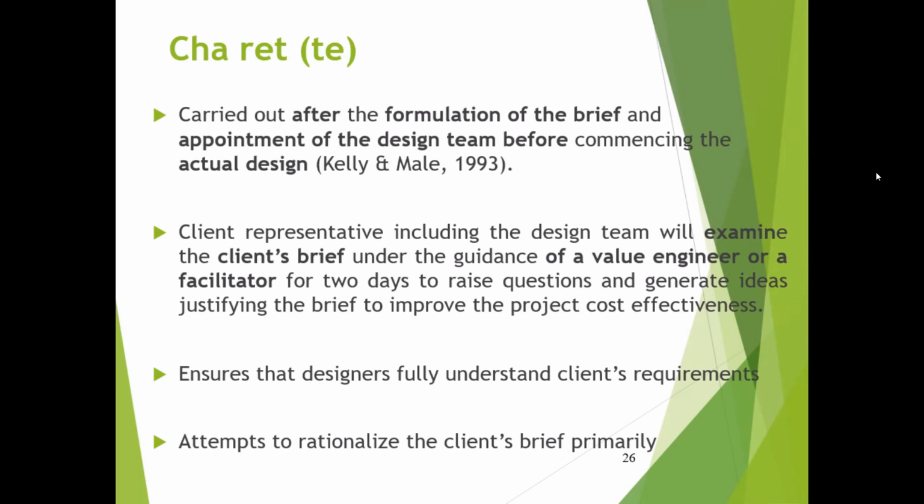Because most of the time the cost effectiveness or the value for the client is not met because of failure to understand the client requirements or the client brief.